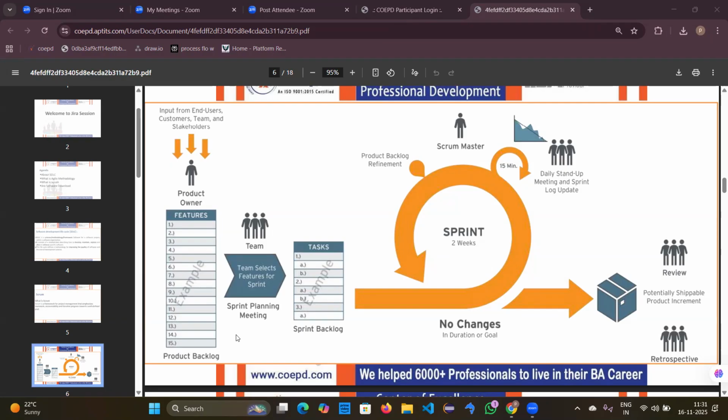And the CP value is nothing but complexity points. This complexity points is also a value, but it will be given by the developer. The developer will be mentioning the effort that is needed to develop this particular feature. So it is just like an effort, how much effort is needed. To indicate this effort, the developers will give a certain value to the particular user story. This value is named complexity points.